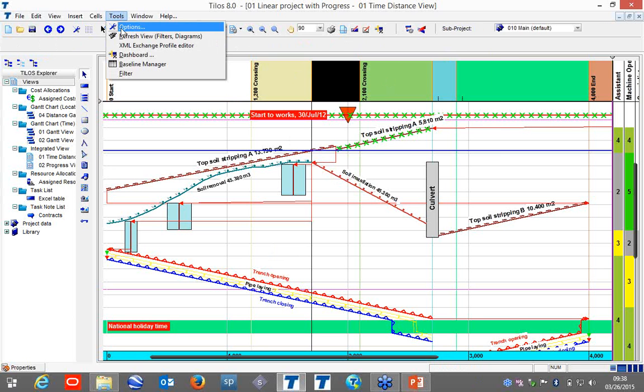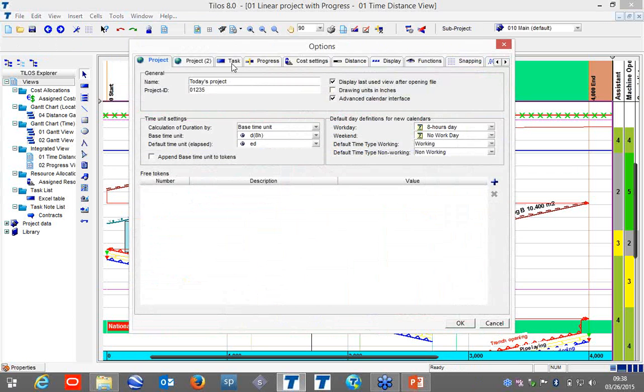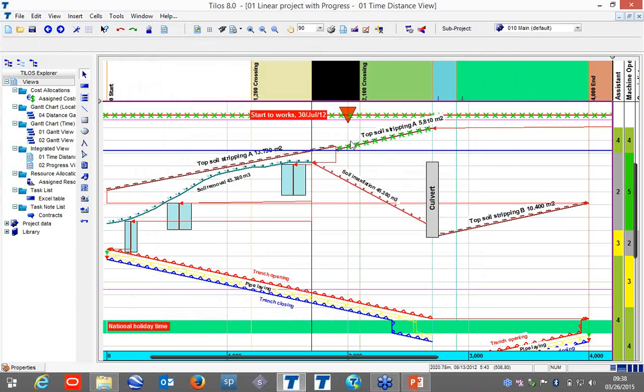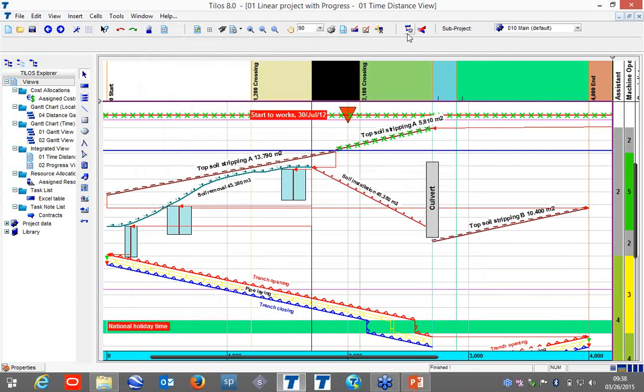So my aim was just to push after the data date, moving the not completed tasks. So you can select now the uncompleted part. It is just pushed considering the links.